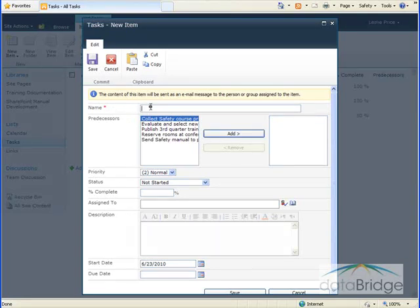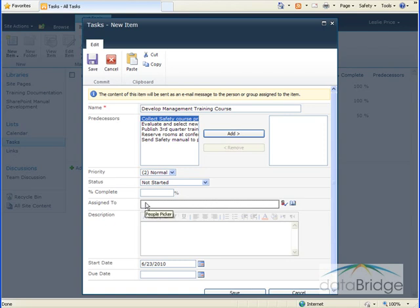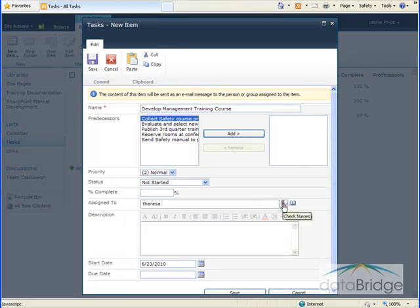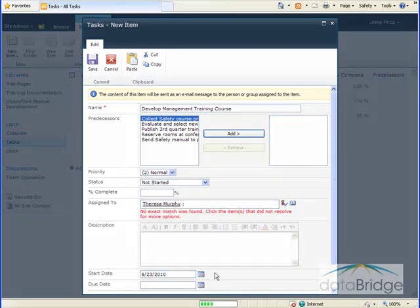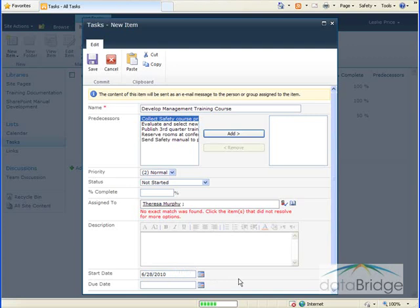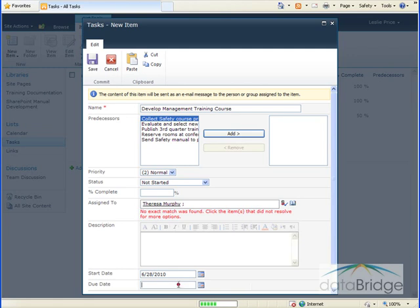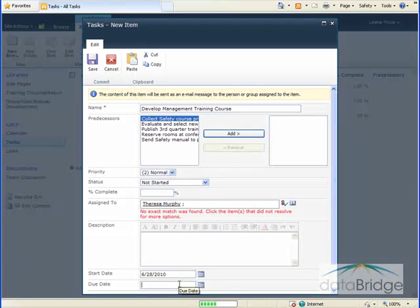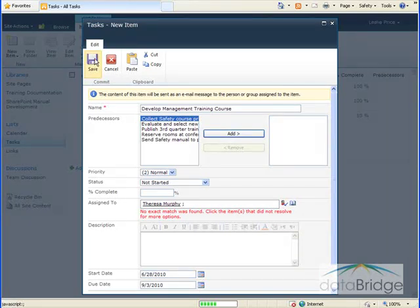And I'm going to assign this to Teresa. For the start date, you would enter the date the first subtask should begin. I'm going to make this June 28th. For the end date, enter the date when the last subtask should be completed. I'm going to enter September 3rd. And then I'll click Save to save the changes.